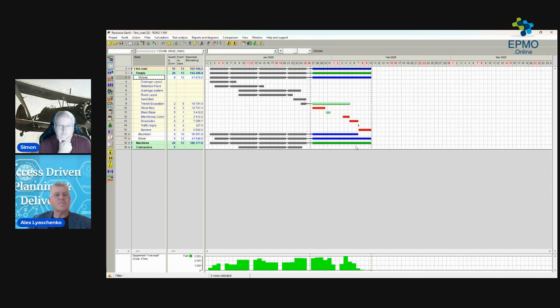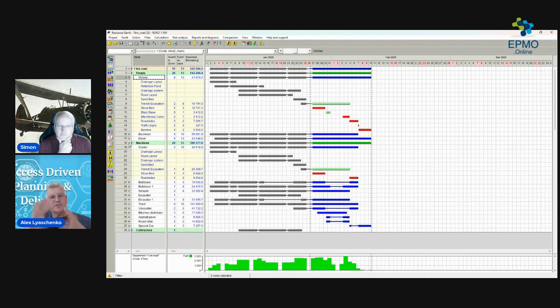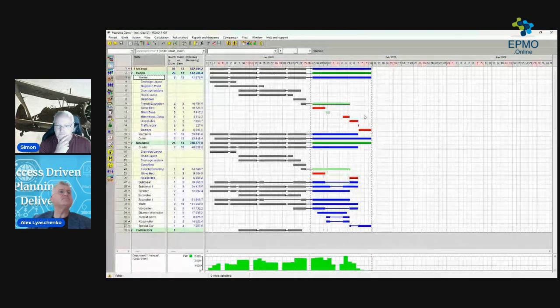Yeah. And this is also very useful for analysis. Sometimes when I've been optimizing resource leveling, I can see which resources are underutilized visually. Sometimes I find it's much easier than to see from data. So for example, I can see immediately on this work, this is assigned to these activities, but also assigned to these other activities, there is a gap. So you immediately visually can see that.